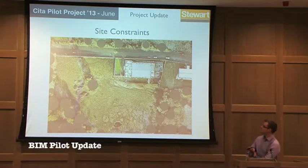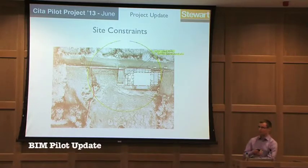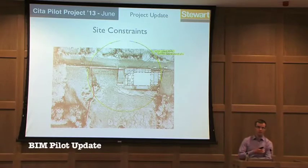We can see from the site layout plan that the building itself is out of the extremities of the site. So that would mean that you cannot really drive around the site with any plant and equipment, which means that you're going to have to put up a tower crane. So that was a rough estimation of where the crane would go, and I basically just drew that on a page with a compass. So there was nothing very technical about it. But obviously the model can show that, and we can put that on the model, and it is shown later. The red line would indicate where there may be protection needed for overhead power lines, and consultation with the ESB Networks, etc., to make sure that's feasible.